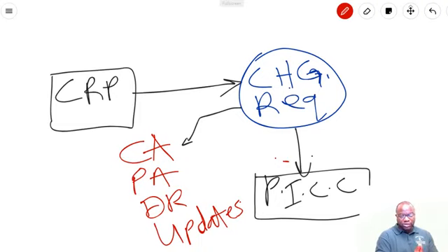Maybe getting some clarification and then coming up with a final idea of what the impact of that change request is going to be. See? And then after you're done with that, the next thing is to send that change request along with your analysis and your recommendations to the change control board or the responsible authority. If you read the PMBOK guide carefully, you realize it's not always the change control board. Some projects do not have CCBs. It could be the PM and the sponsor. So it is important that you understand the context of all of this.